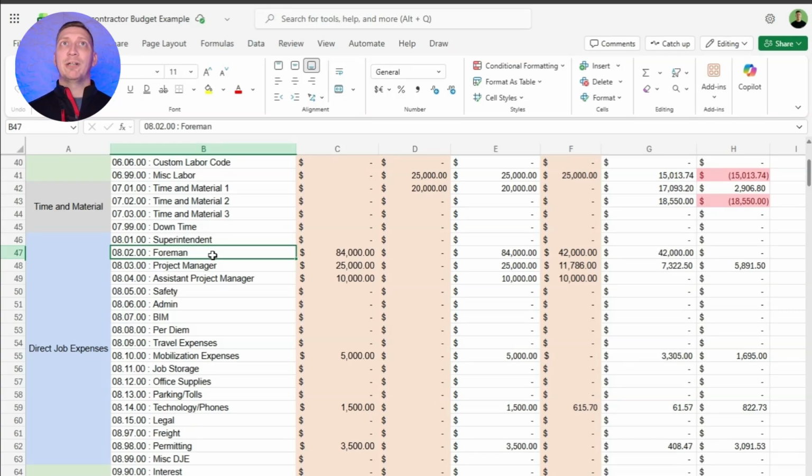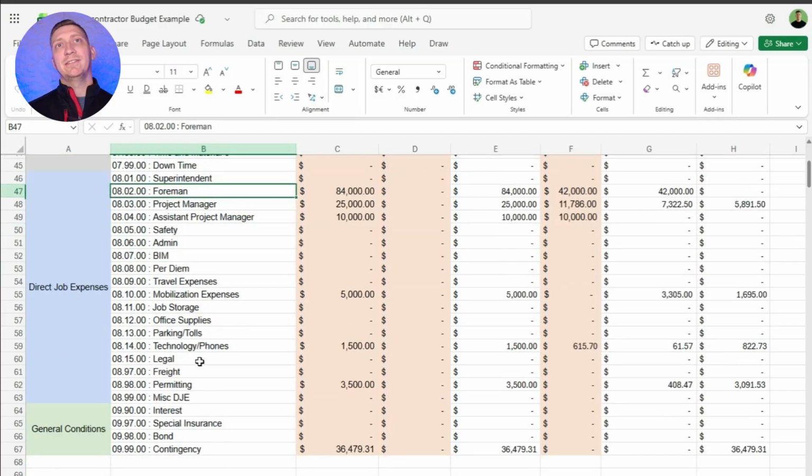And this is the first red flag, when we set up their job cost codes. I'm like, here's the typical things. Which one do you want to leave out? And they say, well, all of that's overhead. Well, no, it's not. And we're not going to allow it to be, because in a time and material change order, I need to be able to know that it's being tracked properly so we can show that. This should be your general conditions, or part of on that page.